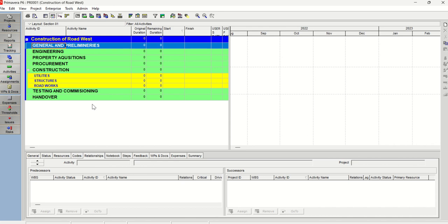Based on what we have created, our next approach would be to get a high level activity list by going through your contract documents, and that may include your bill of quantities, your drawings, IFCs, your conditions of contract, your authority requirements, your tender documents, letter of agreements, and so many other documents.